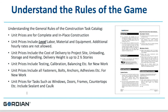The unit prices include the cost of delivery to the project site, unloading, storage, and handling — delivery height is up to two and a half stories. Unit prices include testing, calibration, and balancing for new work. Unit prices include fasteners, bolts, anchors, and adhesives for new work. Unit prices for tasks such as windows, door frames, and countertops already include sealant, meaning you will not be adding sealant or caulking as separate line items.